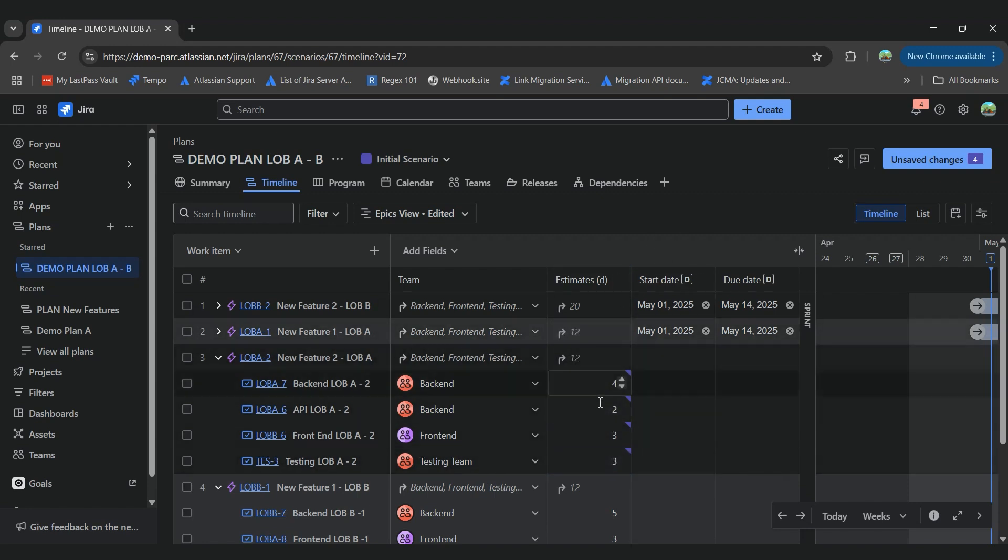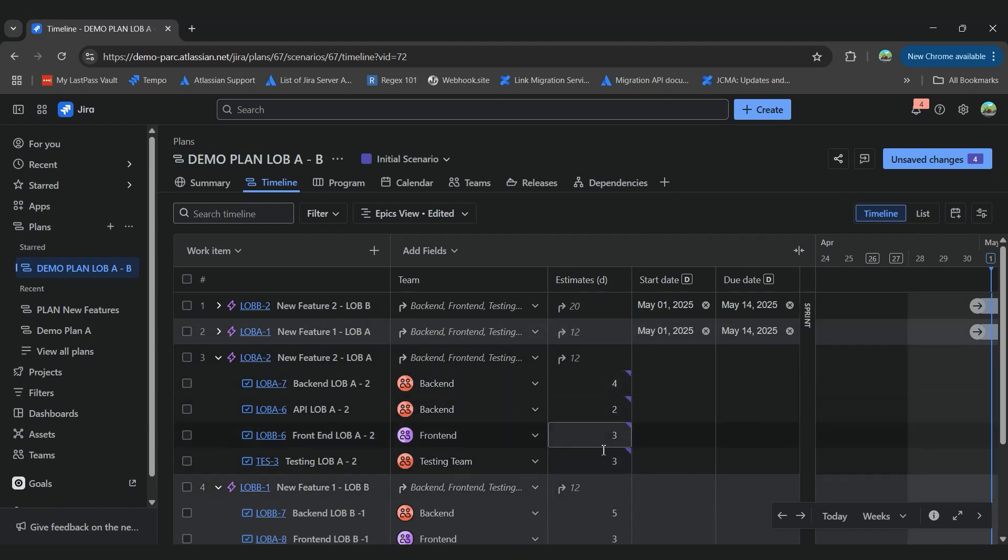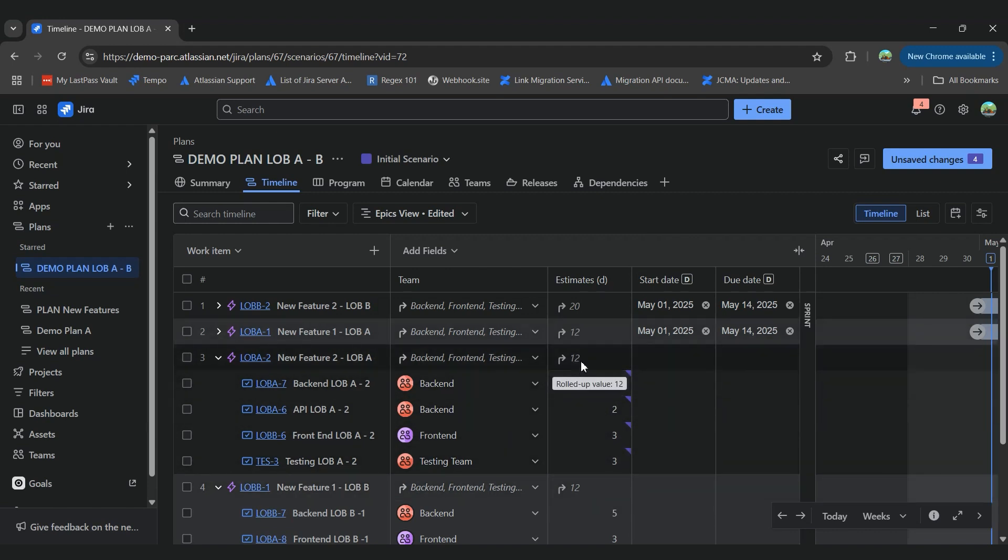So as you can see here, while we are adding this information in the estimates, it rolls up the information directly to our epic. So it will add up the number of days that we need to complete our tasks under the epic.